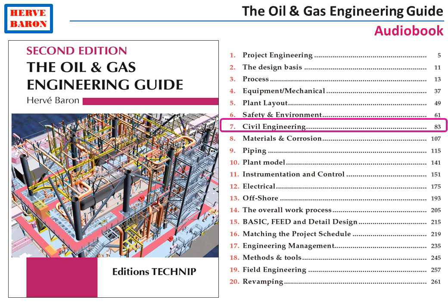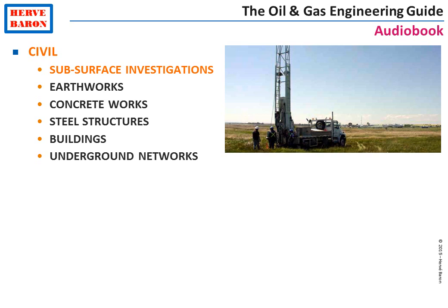For a land facility, the first step of civil engineering is subsurface investigations. Soil investigations include topographical, geological, and geophysical surveys, including collection and analysis of soil samples.